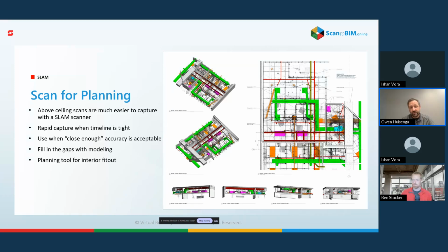The biggest reason for that is, if you can see the dark red pieces of steel again, originally it was expected that those pieces of steel were going to land inside of an existing partition wall. It was also going to interfere with the existing light blue and green ductwork and equipment. What we found is we actually had just enough room to fit those pieces of steel up and in and around those elements without having to cut and remove them.